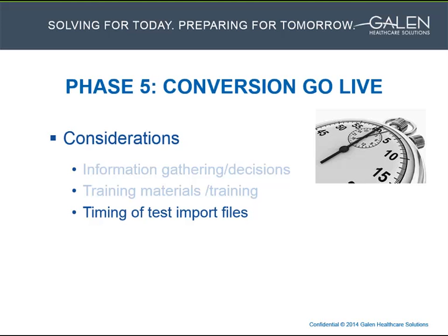The team can then use this information to put shape around the conversion timeline for live. For example, discuss things like, is there any flexibility with when the start of the conversion can happen? For a weekend, let's say, we know the files are going to take quite a while to load. Could we start the conversion on a Thursday night versus a Friday night, as an example?